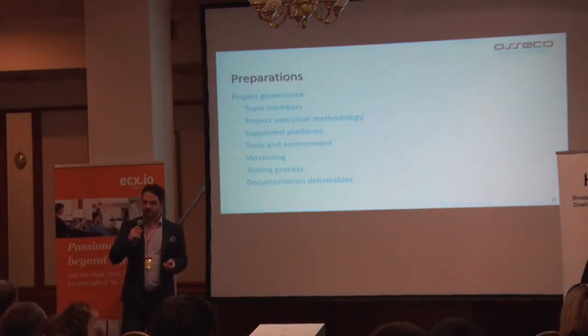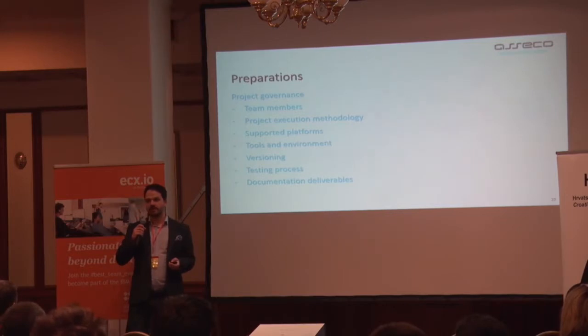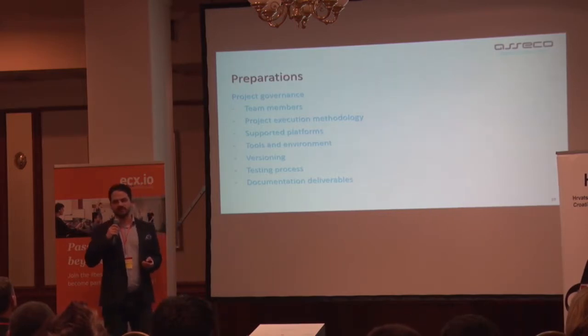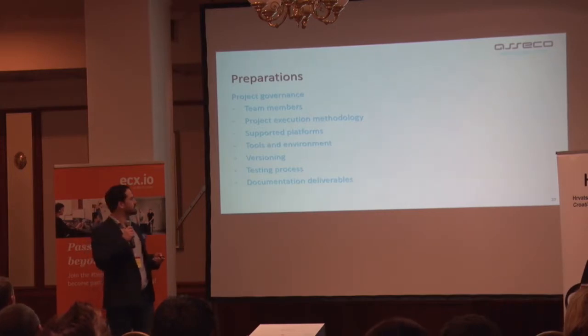So what we built was the project governance document. That document was identifying everything that the new developer needs to know how to operate in his working environment. That is the document that doesn't need to go over 20 pages, because imagine that you're giving the developer a 100 pages document. He's not going to read it. He's just going to toss it in garbage and it's useless. It has to be less than 15 pages so that the developer can read it and everything is clear and crystal clear so that he can go on with it.